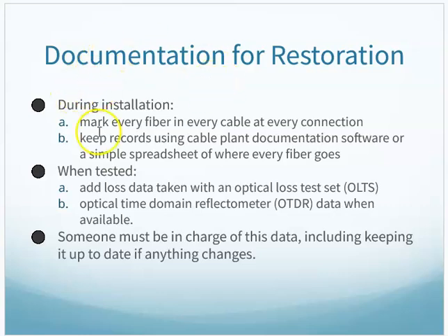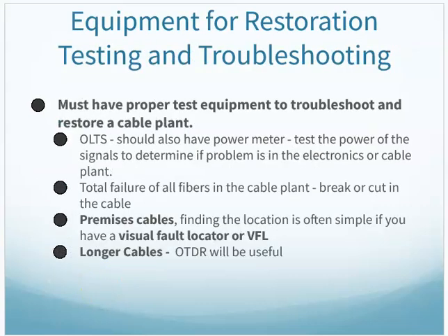Documentation during the install: mark every fiber, keep it labeled, keep records. When tested, add all the testing data. And there should be somebody in charge of keeping all that up to date. And that is going to help with your troubleshooting and restoring, if you will.